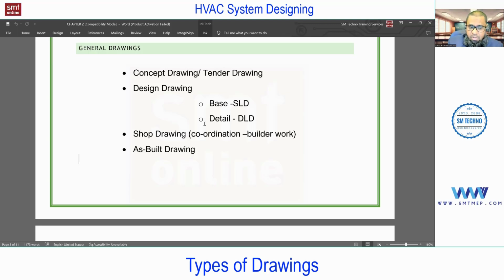And why the need of the as-built drawing? Because the work is already done. Why the need? For maintenance purposes. Exactly. For the billing, the final bill, and for maintenance. Even for the final bill, the actual length of the pipe, the metal used, etc., is going to be extracted from the actual conditions. So it is needed to prepare the final bill as well.